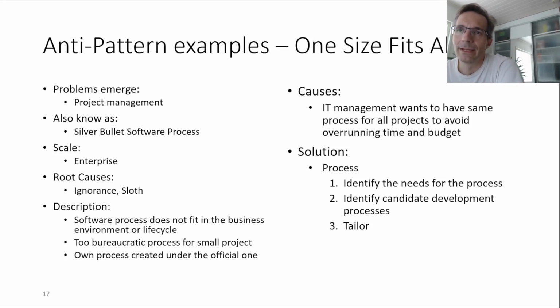So you try to apply maybe the traditional waterfall model process to a project where the requirements are really ill-defined. No one really knows what the requirements are. So you would have to actually do a prototype, send it to production, and go through this discovery process to figure out even what the requirements are.